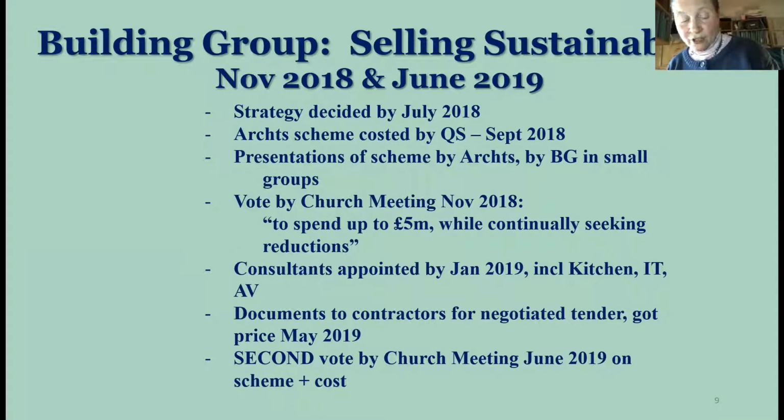The only way I could check if they had actually included them was to read through the 10,469 items in the tender bill of quantity, which I did. Even then, I had not yet realized that the architects assumed, and most people assume, that simply meeting building regulations was a high enough standard of insulation.